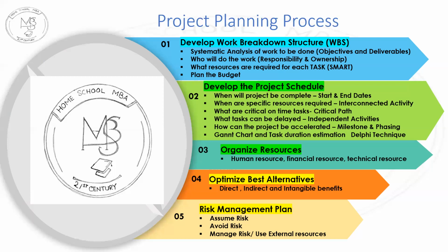And while planning the budget, we make sure that there are certain buffers built in to take care of the future risk, which could be caused due to natural disasters or some accidents or unforeseen situations. So normally about a 10 to 15% plus minus buffer is worked out.